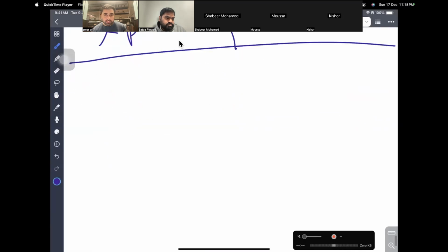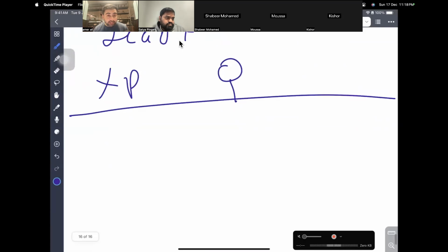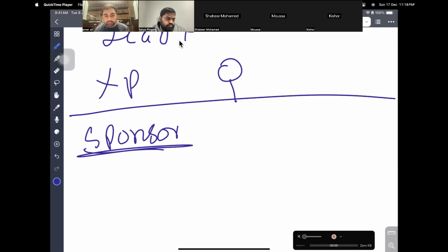Once the project is completed and accepted by the client, we get an approval from sponsor and we start closing the project. It is possible that your project is not completed, or the project has too much risk, or money is out of the way. Then you may have to prematurely close the project. Whatever it is, sponsor approval is needed.